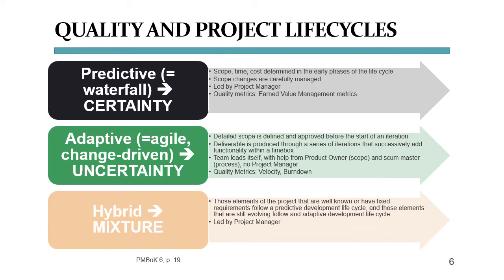We have seen that if you know what you're going to build or deliver and your engineers know how to do this, maybe have done this many times before, your risk of getting it wrong is low. You may even have already tested code modules or hardware assemblies available that can just be integrated in your delivery. In such a case, a predictive or waterfall project structure is appropriate. If you and your client, however, have a vague idea as to what your deliverable is supposed to look like, but you're fuzzy on the details or you expect that major aspects in the design will change, developing in small increments and testing frequently is your ticket to success. In that case, you will want to turn to an adaptive or agile management model.